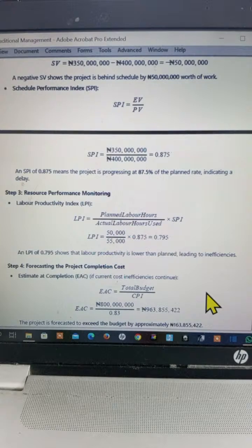But when you have competent teams that are monitoring the project for you, they will advise you that this is what happened. This particular decision of changing your design, this particular decision of changing your scope, this particular alteration of bringing in importing materials rather than the architect. In a situation where the architect even recommends or specifies materials that will not be locally sourced, if you don't monitor such things and understand how to plan for it, you'll find out that there will be delay in timing because they are waiting for material. But if you had monitored and know that this is the nature of importation, this is the cost that will be required, and we need to import it in bulk and bring everything, so you make their quotes in that direction. If not, the project will run into serious delays.